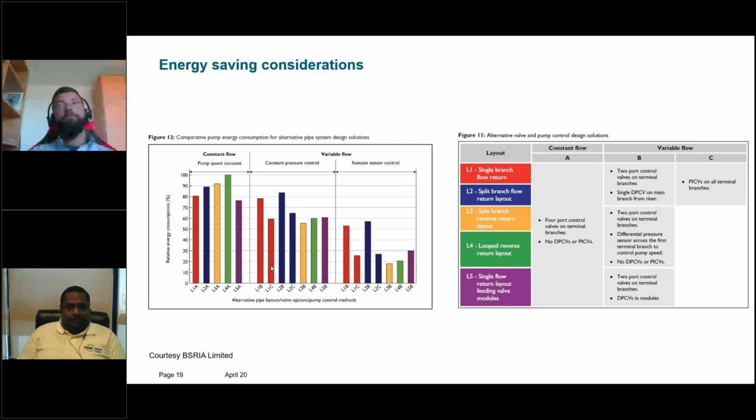All right. My next question is to Jörg. What are the commissioning requirements for the intelligent valve solution? Basically, the pipes have to be filled with water, the pump is running, and you need power supply to the intelligent valve devices, because you need to connect to the device with the mobile app. Then you can do the pre-setting and also the setting of the delta T limitation and so on. So all the features in the product are available in the app, and once it's connected to the system, you can do it remotely. Yes. Okay, I think it's clear.